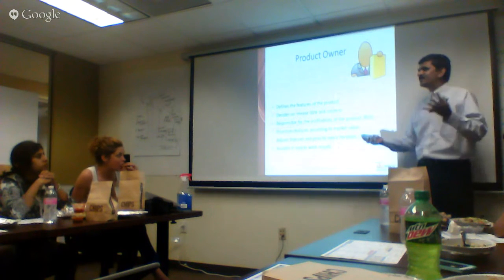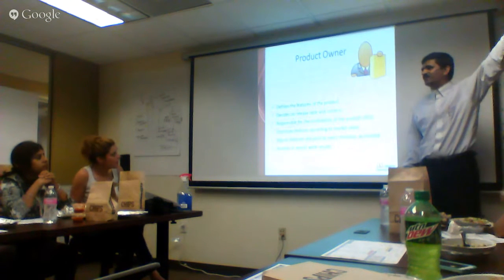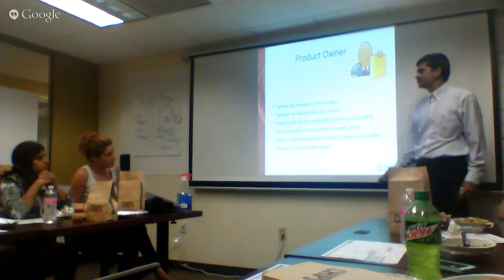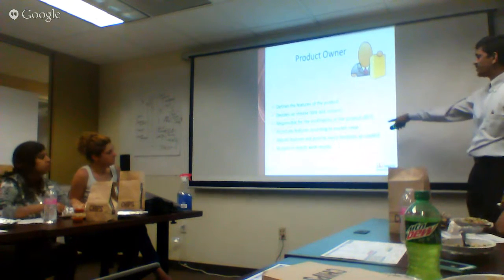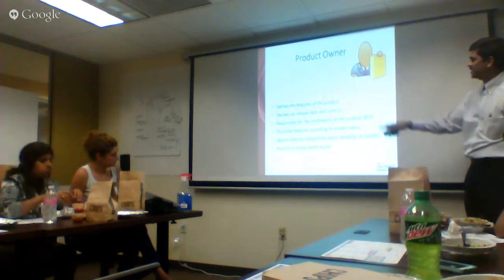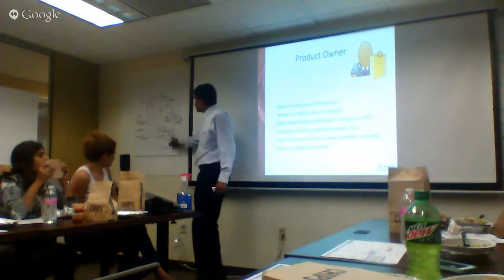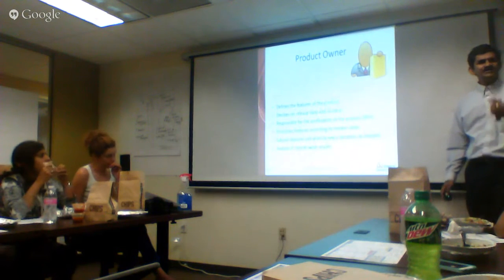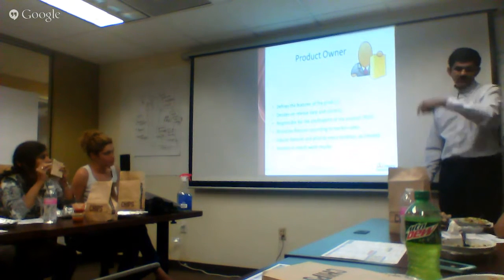Because that sponsor has other ways to earn money. He might invest in the stock and get more return than what he invests in a team. So you want someone to maximize his return on investment. So he's the person who helps the customer. He prioritizes the features according to the market value. He adjusts the features and priority every iteration, every sprint, and accepts or rejects the result at the end. During the sprint review meeting, he says, oh yeah, this is what I asked you to do. You have done the work. Good, I accept it. Or, this is not what I asked. Remove it. Do it again.